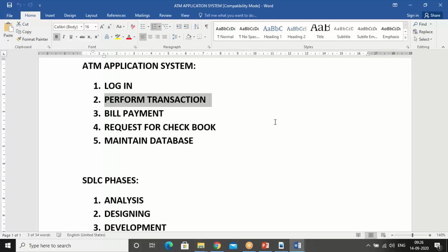Here you are going to have only one product backlog and only one product owner. You can have multiple Scrum teams and multiple development teams, but there should be only one product owner and only one product backlog.